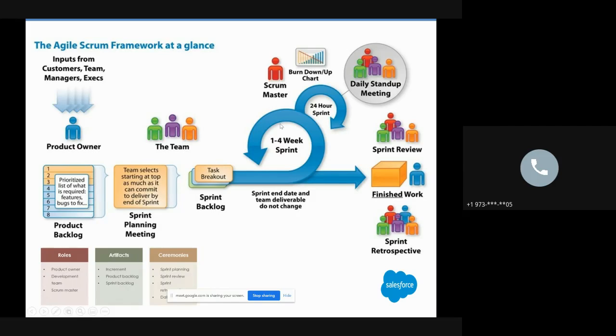So the Scrum Master would have a daily stand up. You see here, daily stand up meetings. This is a time boxed event, right? It's usually 15 minutes. And again, we are flexible. You don't have to stand, you can sit down and all those things. The whole point is to come together, all the team members, for 15 minutes and talk about what was done yesterday, what anyone is working on today, and if there is any impediment or roadblock, right?